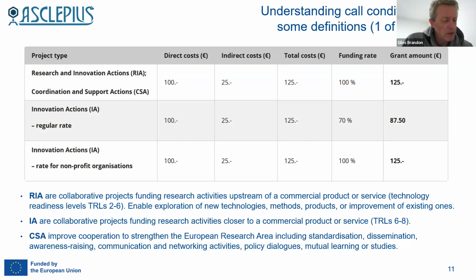So overheads would be things like the buildings where you're working. There'll be heating, electricity, water. Maybe buildings are being rented. You'll also have, say, administrative staff helping to run the organization. These are examples of overheads. And somehow they also need to be accounted for when you're running projects.